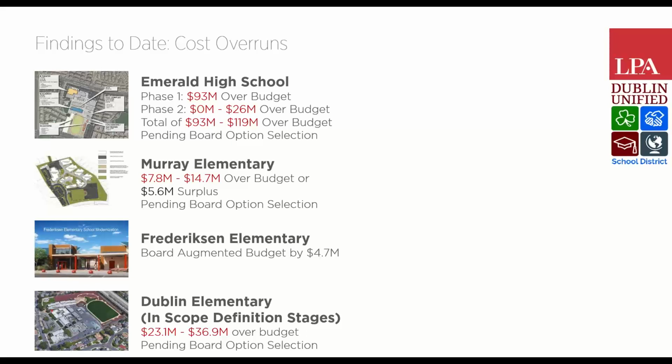But right now, what we're doing is we're defining the projects and the programs better by square footage of various types. So a new project will be defined by how many square feet of classroom space, how many square feet of administrative space, how many square feet of like NPR or gym. In other words, we're defining the projects more closely with square footage, and then we're applying whatever our best numbers are for square footages for each one of those categories.